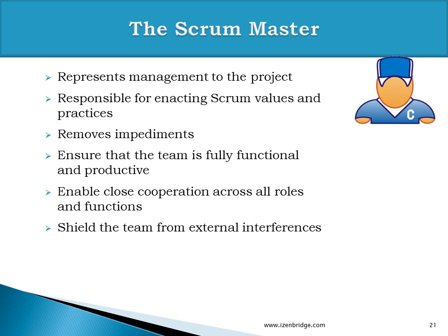He is the one who is responsible for removing impediments. If team is facing some issues which is beyond the control of the team, for example, they are expecting some interface document from some other team which is not yet received, he is the one who needs to sort it out. If team is facing an infrastructure issue, they need a server to run their integration build and they are not getting it, he is the one who is responsible for resolving it.